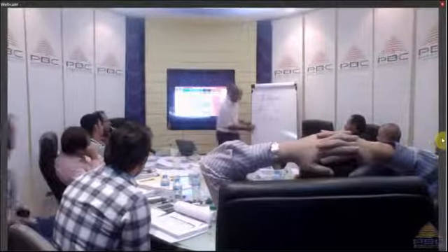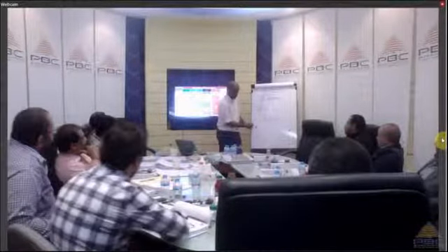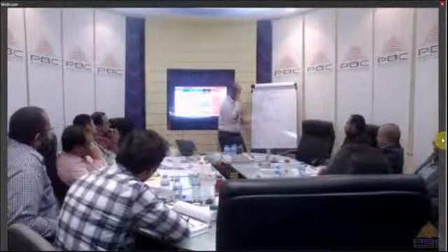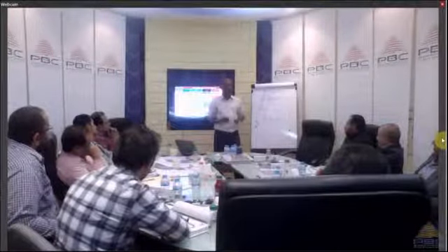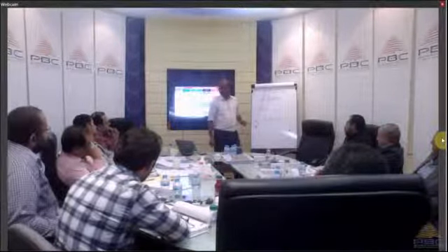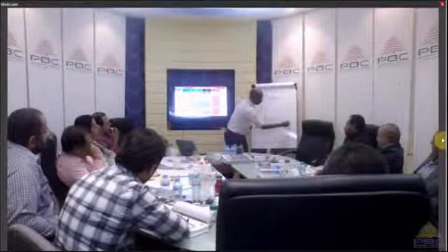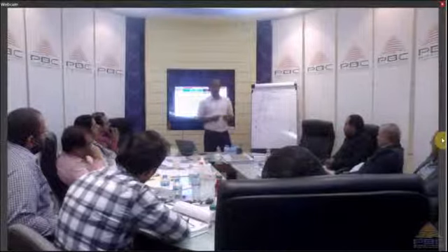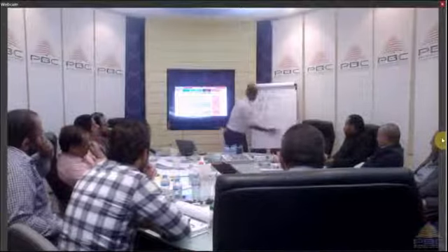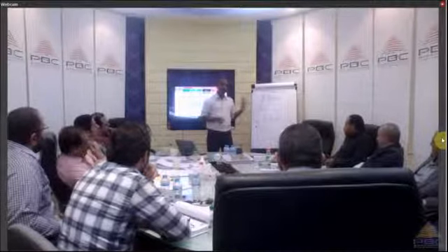So if we start planning today and we finish next month, today our range of estimate could be anything plus or minus 200%. We could be doubly wrong, up or down. By the end of the estimation period, our accuracy will be plus or minus 50%. Why? Because of progressive elaboration, more details until we get to a stage where we have a good idea about the cost. Management has to understand that.